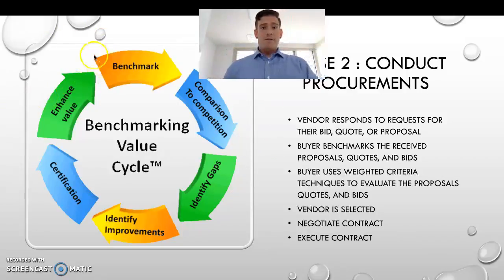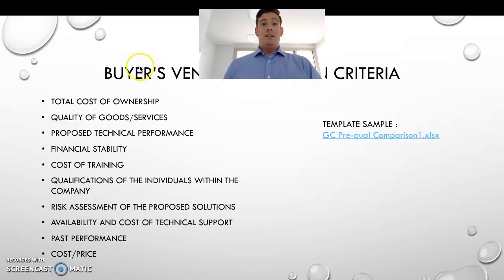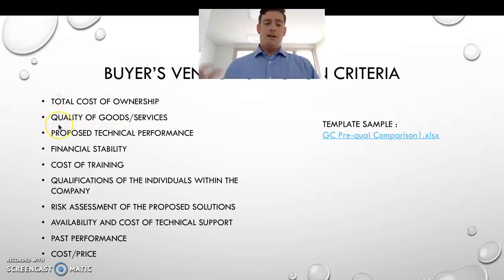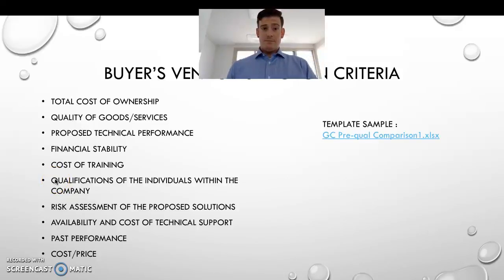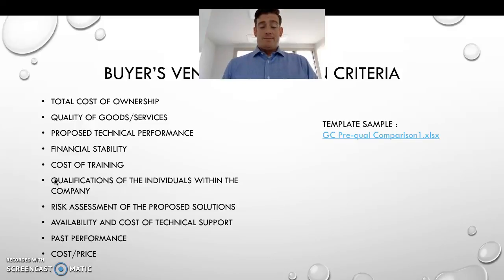Here's a flow chart of the benchmarking value cycle. Now, buyer vendor selection criteria - these are some of the things buyers would have in their selection criteria to determine who's the best fit: total cost of ownership, quality of goods and services, proposed technical performance, financial stability, cost of training, qualifications of individuals within the company, risk assessment of proposed solutions, availability and cost of technical support, past performance, and cost and price.